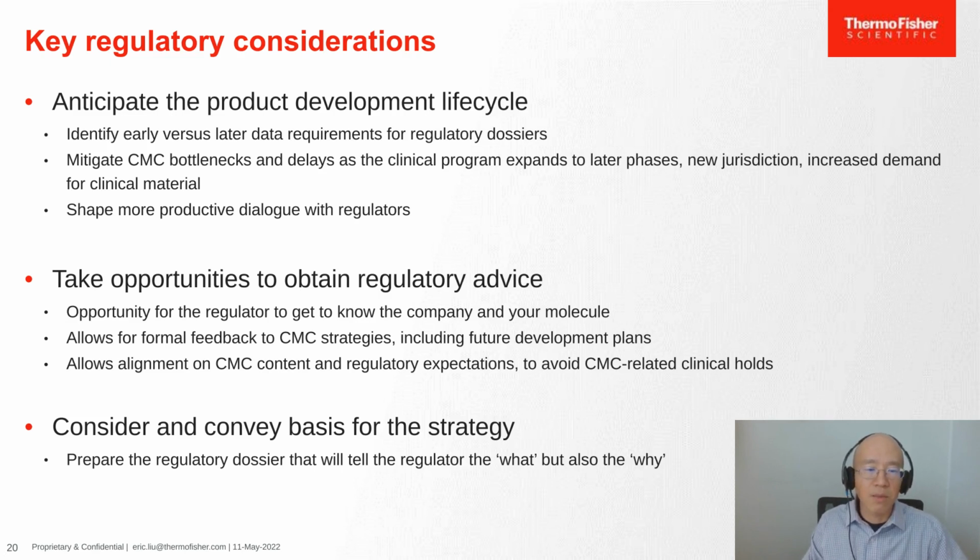Second, write the CMC dossier to fit the broadest possible audience, keeping the dossier jurisdiction neutral, allowing it to be used for other jurisdictions to facilitate future lifecycle flexibility. And thirdly, plan to include key CMC highlights and plans in the pre-filing meeting to advise what's coming next in the dossier. The best time to seek regulatory feedback should take into consideration your overall timeline to enter the clinic and engage regulators early enough to allow time for consideration of their feedback and make adjustments in your development plans.